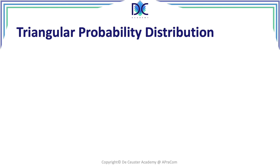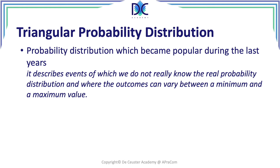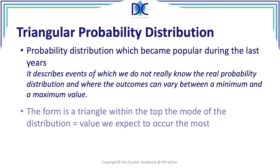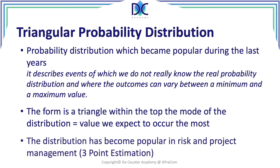The last distribution is the triangular probability distribution. It has become more and more popular and describes events where we do not really know the real probability distribution, with outcomes that vary between a minimum and a maximum value. The top of the triangle is the mode — the value with the highest probability — and this distribution has become very popular in risk and project management based on the three-point estimation.